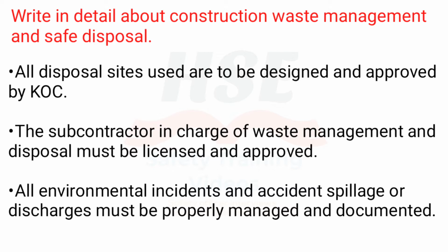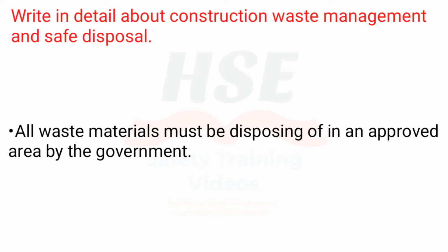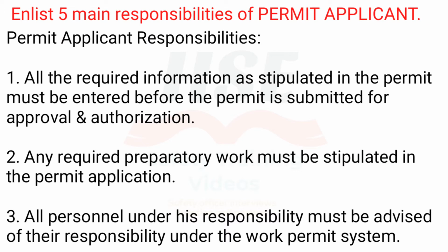The subcontractor in charge of waste management and disposal must be licensed and approved. All environmental incidents and accidental spillage or discharges must be properly managed and documented. All waste materials must be disposed of in an area approved by the government. Enlist 5 main responsibilities of permit applicant.